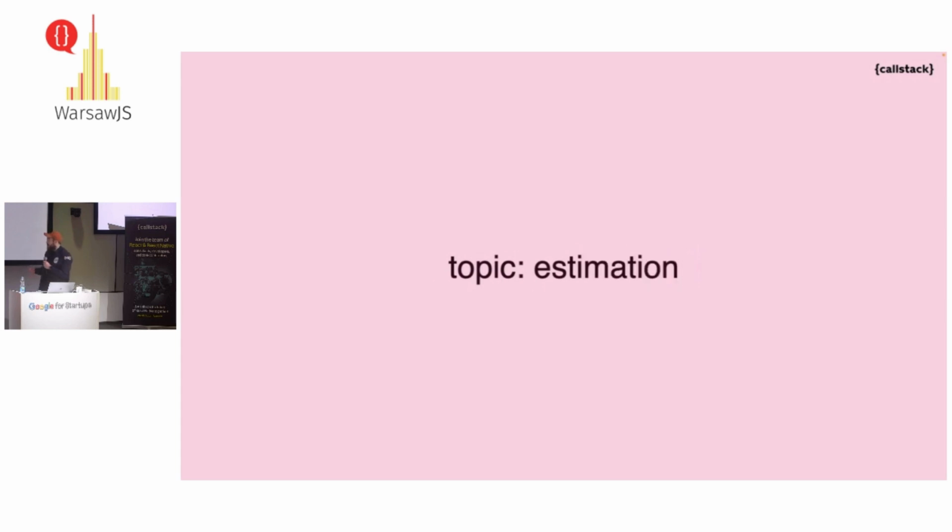So estimation. I cannot give you a ready-made solution for the estimation, but I can provide you some hints or tips on what you should consider during the estimation. Expect the unexpected is the first one. During the development, you will face some blockers, which have to be discussed within the team and resolved with the highest priority. So consider the time for internal discussion and finding the solution. Also remember about the time for manual and unit testing, especially when you have a lot of scenarios to cover.